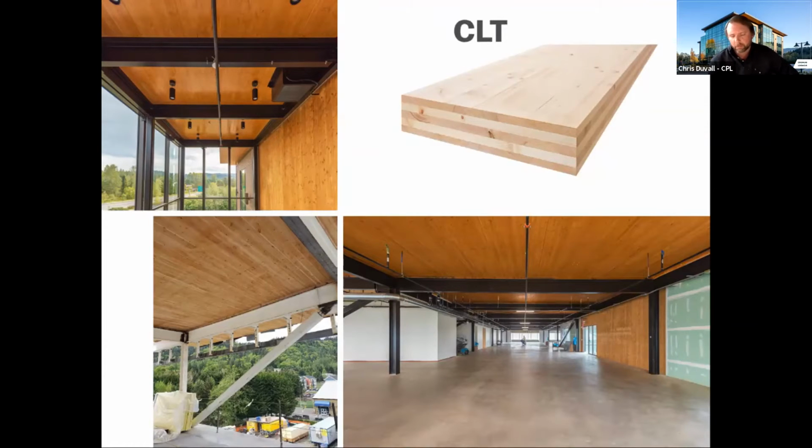The 3B carries a 0 rating, and that's really important for the timber. It's important for the steel too, because with that 0 rating, you don't have to upsize the timber, which would cost more money. So you're getting a savings there, and you don't have to fireproof the steel. The design all along was we really wanted to expose the structure, and type 3B allowed us to do that. Maybe one of the lessons learned, if you take anything away from this project, is to work on establishing your construction type early in design so that you can realize what you can do. It'll tell you what you're allowed to do with the project. We were able to do that with 3B on this one, and it worked to our advantage.